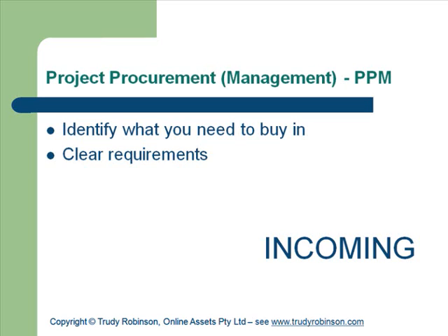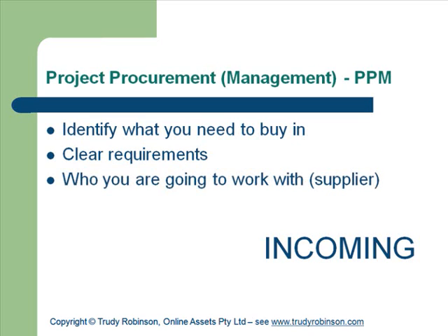So we need to identify the clear requirements. Quite often, remember when we were doing the HR subject, you did a position description and you had KRAs, key result areas, KPIs, key performance indicators. Well, you do a similar sort of thing for this. Sometimes it's called a statement of work, and you have a whole bunch of different names, but what you actually need is to clearly identify all the requirements around the thing that you're going to procure into the project.